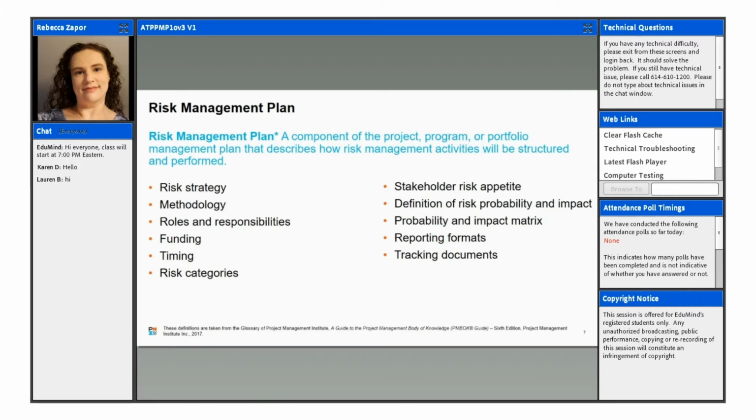management. It's also going to talk about funding, and that's where you have the budgeting information that's going to estimate and identify the risk funds that are going to need to be included in the cost baseline, and how contingency and management reserves are going to be estimated.